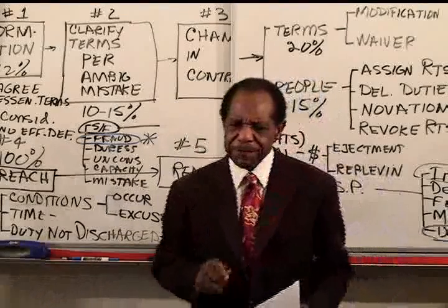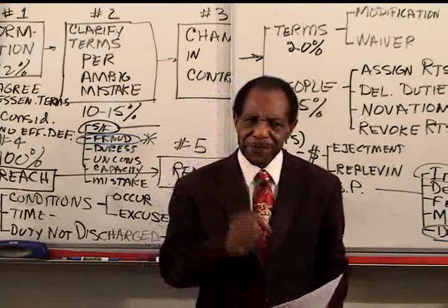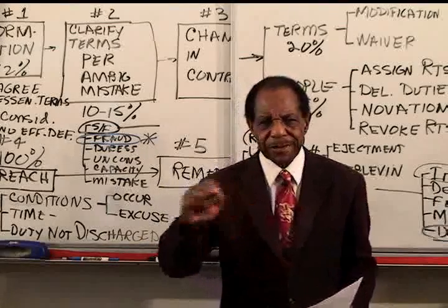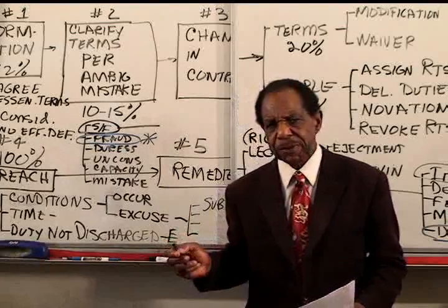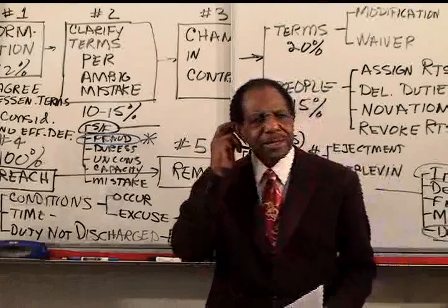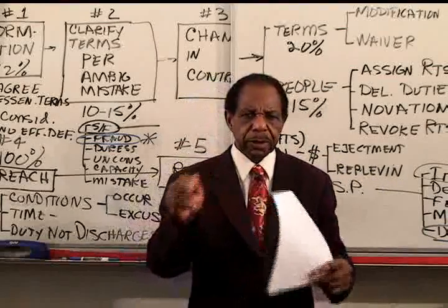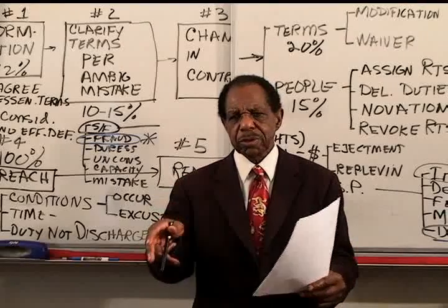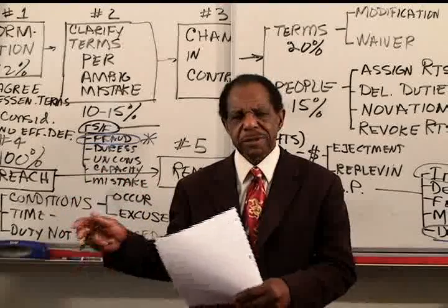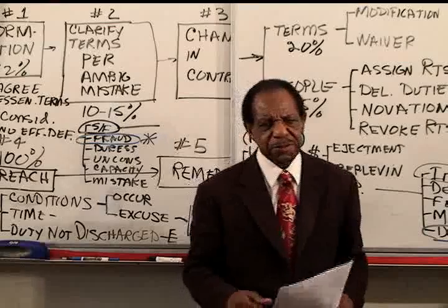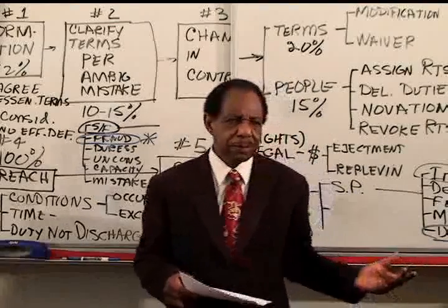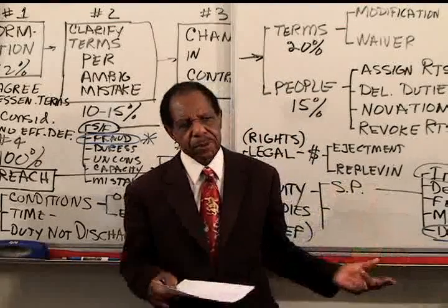Now, do we have fancy taste here? Because if we have fancy taste, then the builder has to meet those standards, even though it's difficult. And so I think you may have fancy taste here, because if you look at your house, you want the shingles on the roof and the shingles on the garage to match. And you'd say that was fancy taste, and the builder should have matched them perfectly, even though it cost a little bit more.